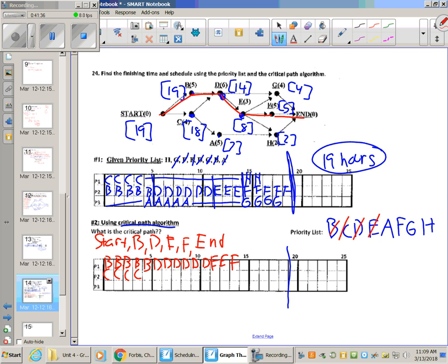All right, moving on to A. A only had one prereq, and that's C. So as long as I keep it past C, we're good to go. So past hour 4. And again, I can give it to P2 or P3. All right, I'm starting to feel bad for P3. Why not just go ahead and give it to him? 1, 2, 3, 4, 5. Okay, so A's out. That means that P3 was idle all the way up until hour 4.